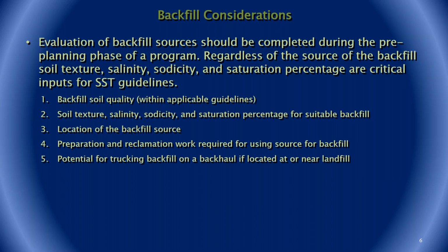Consider the location of the backfill source and potential preparation and reclamation work required for using a source for backfill, and potentially trucking backfill on a backhaul if located near a landfill. A nearby landowner backfill source may be a good representative background soil for the conditions of the site and have some cost savings due to proximity. If landowner backfill does not substantially increase the size of an excavation or cost, it could be the preferred source location.